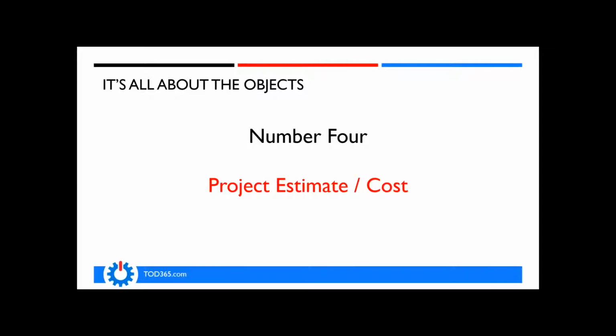And a couple of years ago, they spent X number of dollars to get the system up and running. 2 years later, we're doing an upgrade for them, and our starting upgrade quote was 2 times that implementation cost, right?